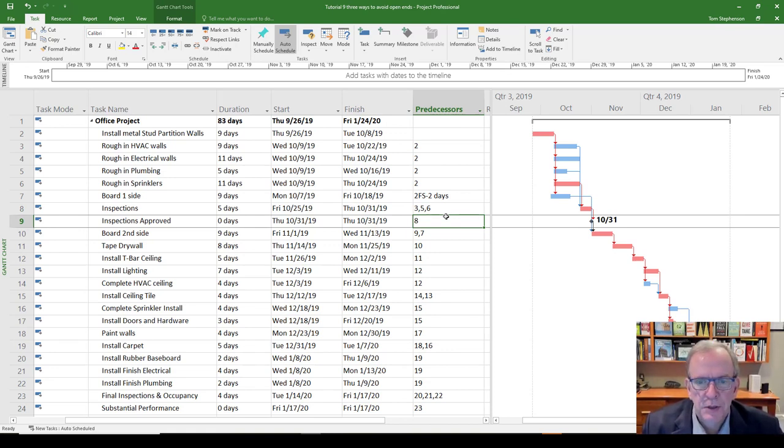And I asked the person that put the schedule together, does it have any open ends? And they said confidently, no, there's no open ends on this schedule. And then when I reviewed it, I found 21 open ends. Well, 21 open ends, I guarantee you, when you connect those things up, it's going to change your dates, because some of them are on the critical path, maybe not for every one, the ones that have float and they're not really driving the project yet, because when you update, when things happen, it does change how your project is going.